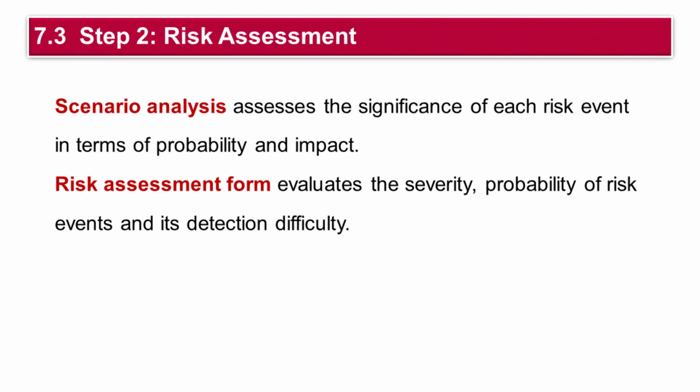Defining impact scales can be more complex, as different risks affect project objectives in varying ways. For example, a component failure might cause a minor schedule delay but a significant cost increase. If cost control is a top priority, the impact is severe. However, if time is more critical, the impact might be considered moderate.